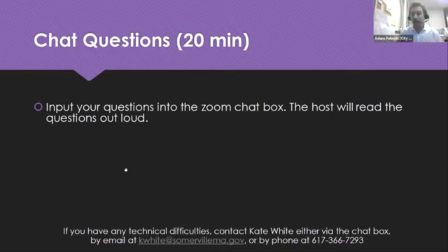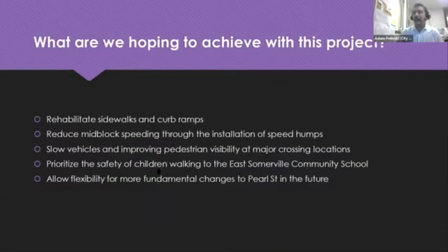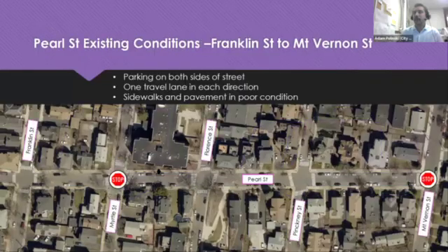However, we need to figure out whether or not that would conflict with any utilities underneath. If those utilities are right in the middle of the street and they're only a few feet below the surface, obviously that's not going to work because we have to have room for the tree roots. So if that's not possible, we'll likely consider something a little more subtle, like you saw in the earlier slide. I'll go to it now.